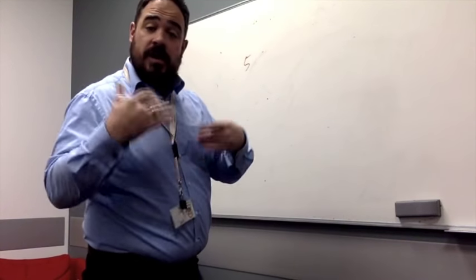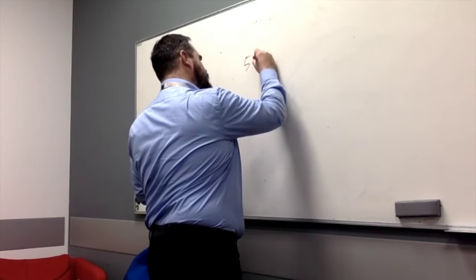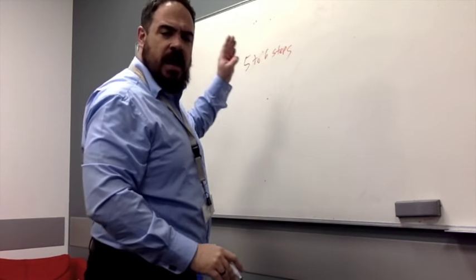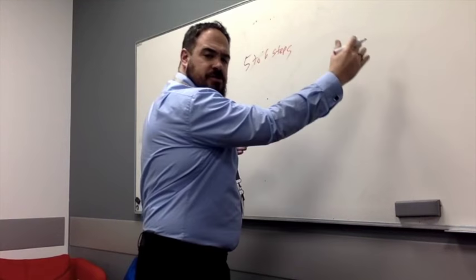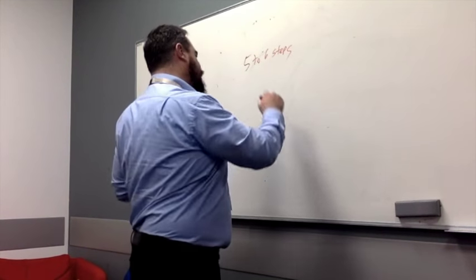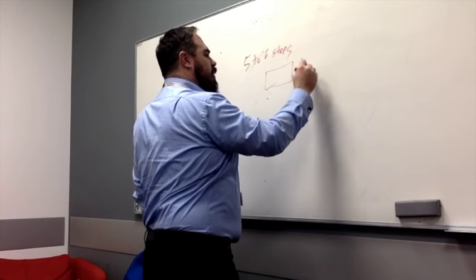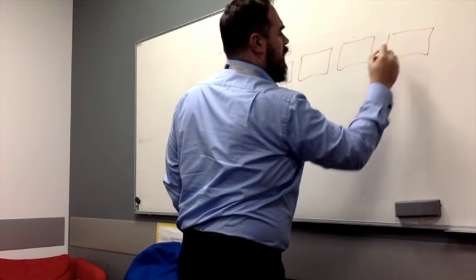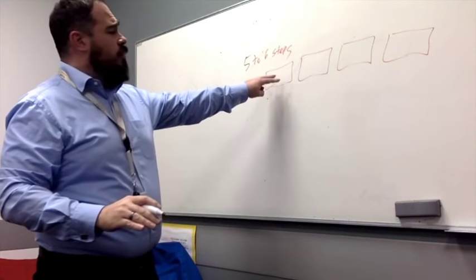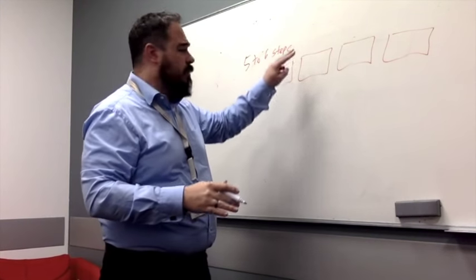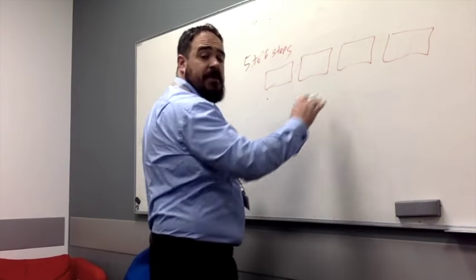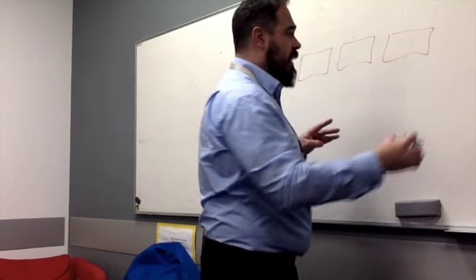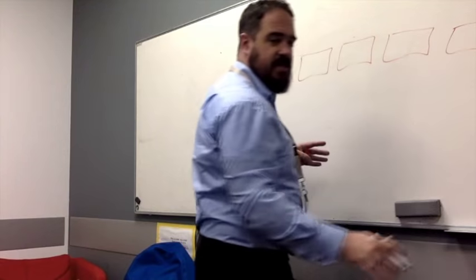So we start with level 1, high. 5 to 6 steps, just to get a high-level understanding of how we go from that start to that stop. Okay? Now, we draw these out. It might be something like: review initial request, plan out action, implement that action, check and confirm, approve and close. Okay, that's 5 very simple steps.